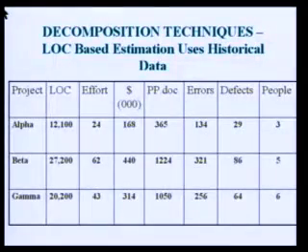Let me once again take to that slide. Lines of code are 12,100. The number of errors are 134. So you have to calculate the number of errors per 1000 lines of code. Roughly taking 12,000 lines of code and 100 errors, you can just divide the 12,000 by 100 and you can see it is something around 120 errors per KLOC. So in this way you need to calculate the number of errors per each KLOC. This is one important estimate.